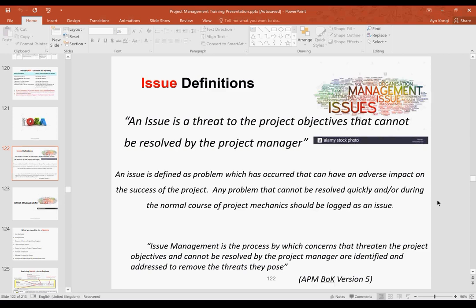Meaning there's a risk of Brexit. There's a risk of people voting Brexit on June the 22nd or whatever that day was in 2016. Now, the result came. Brexit has happened. We now have an issue in our hand. Does that make any sense? There was a risk before, but the moment that thing happened and Brexit happened, Brexit now became an issue. It wasn't a risk anymore. It was now an issue that we now need to deal with. Well, thank God they dealt with it already.